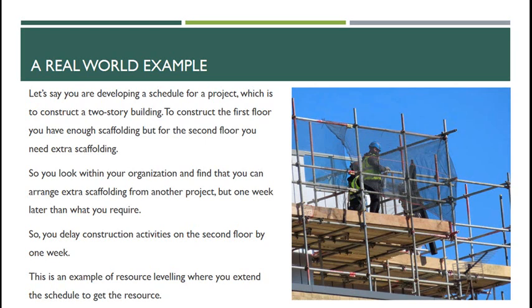And yes, you might argue that your project's going to take a week longer, but it might not actually cost you any more, or in comparison to bringing a contract firm in, the costs can be balanced. So this is an example of what's called resource levelling, where you extend the schedule to get the resource.